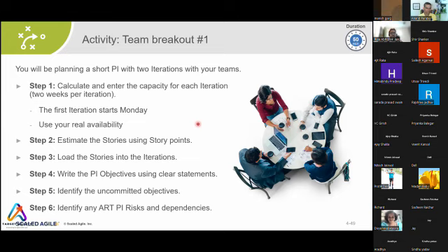But the agenda of PI planning is to have a high-level planning. So try to load 2 to 3 iterations completely, or maybe 80-90%, and the last 2 iterations may be fuzzy. You can say that you need more clarity, and over time you will gain it and provide more clarity to the last few iterations. Of course you can do that, and you have to do that. That is your question.